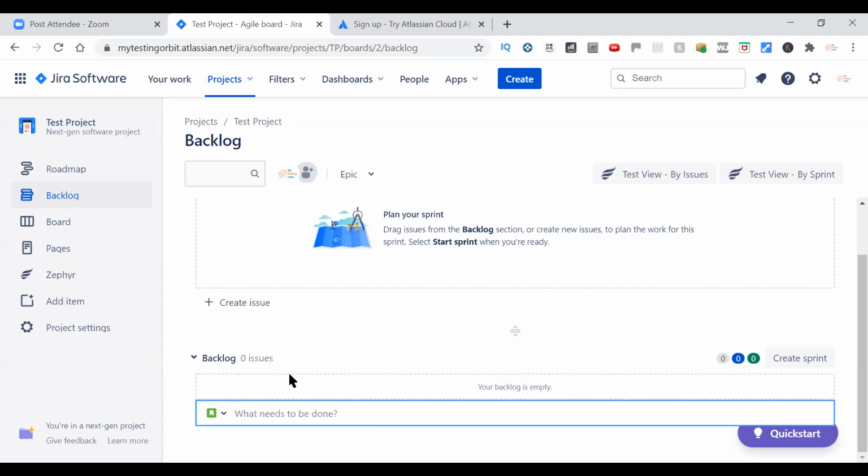During the sprint planning session, we discuss the ones which are on top of the backlog. Let's say that there are 20 items in the backlog, then the product owner is responsible for setting the priorities of the backlog. Then in the sprint planning session, we start from the top of the backlog, start discussing all the user stories, and then we stop when we see that only these many user stories we can take in that specific sprint based on the velocity.